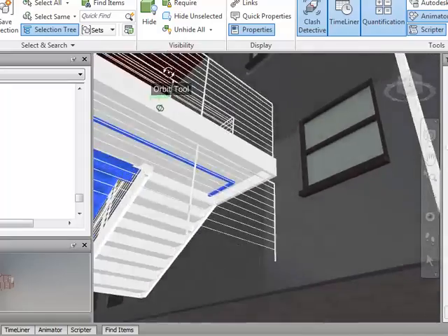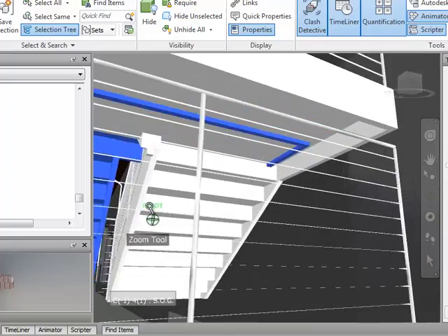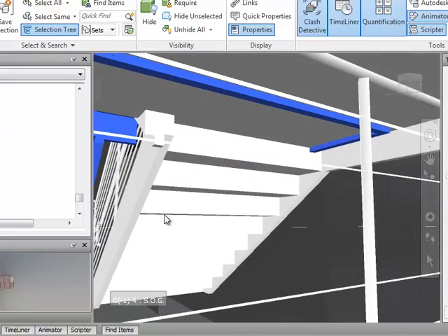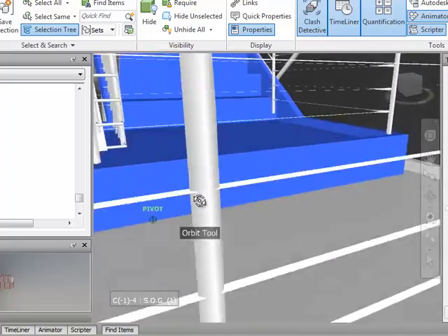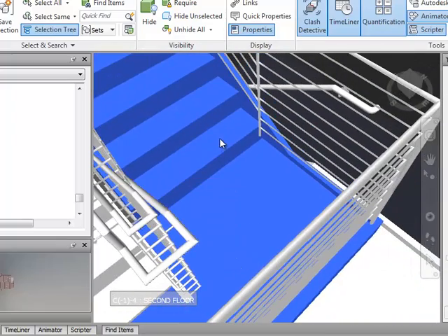So yeah, it looks to me like it's definitely a steel stair, and it's either pan filled or steel tread. Those could be a pan that you would fill with concrete, so you'd have a concrete element, but this would be a steel item in your miscellaneous metals, which is 5,500.